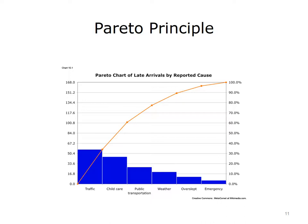The Pareto Principle states that completing 20% of a job provides 80% of the benefit of accomplishing all of the work. In applying this principle to quality improvement, 20% of reasons create 80% of the problems that occur on a project. Pareto analysis uses this principle to identify a small number of activities that strongly impact the project as a whole. A project manager can address 80% of a project's roadblocks by isolating 20% of all reasons for the roadblocks and then applying tools such as the Ishikawa or cause-and-effect diagram. Joseph Juran restated the Pareto Principle as the difference between the vital few and the trivial many.